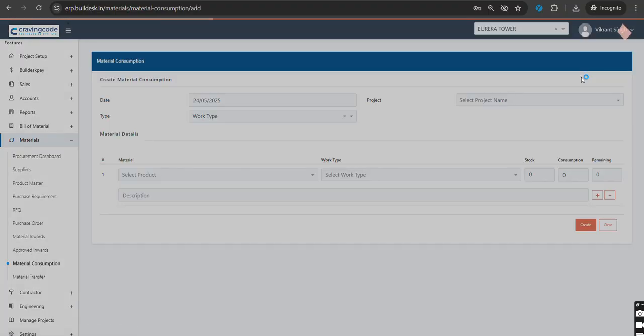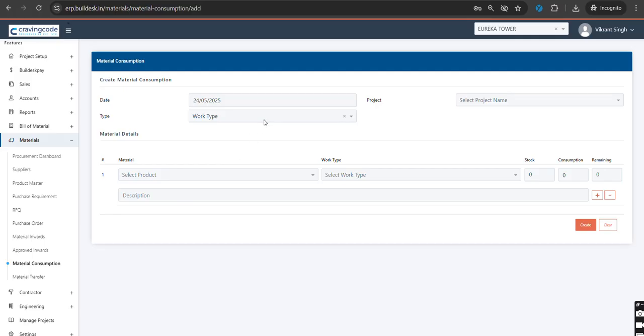When your material is getting used for which kind of work, if you want to define it based on the budget, or if you want to map the usage consumption of the product based on the milestone, you can always select which materials are being used for which particular purpose, what the task and the subtask are, so that even the minute level of breakdown is mapped and gets connected and updated in the system.